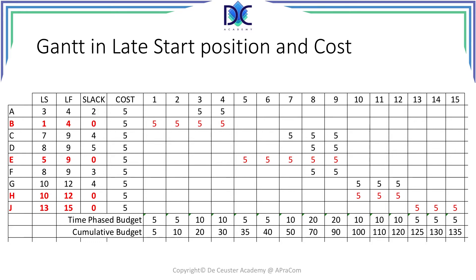We expanded task F, making it one period longer. So now we have a task of 3 periods with a cost of 10K, which gives us 10 divided by 3 — that is 3.333 per time unit. Take that information, complete the new situation — the Gantt in planned start position — and stop the presentation until you're finished, then we compare the solutions.